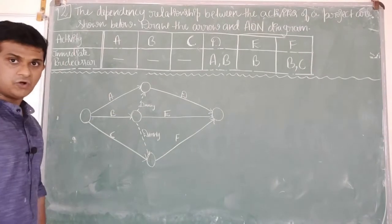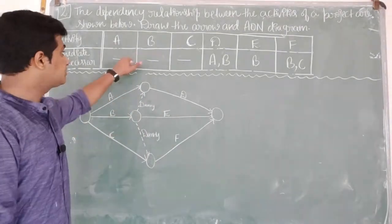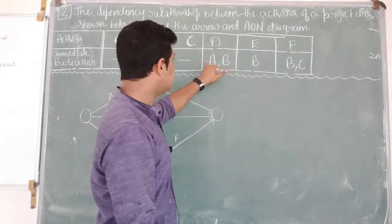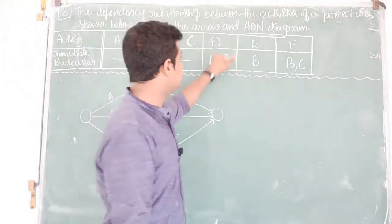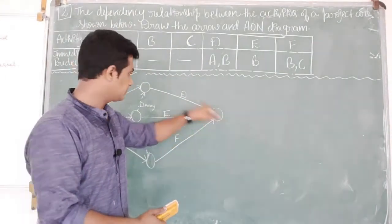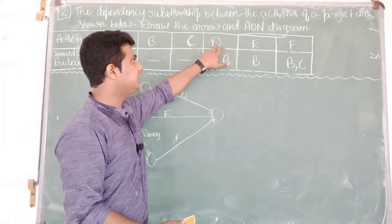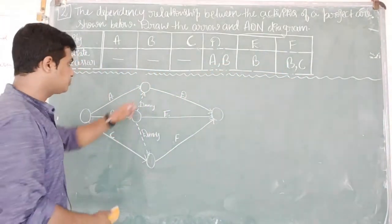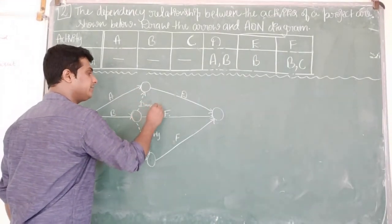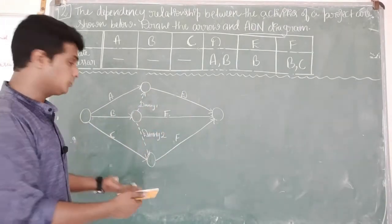So this is how we draw an arrow diagram. Remember three aspects: first, starting activities which do not have immediate predecessors; second, ending activities which do not act as predecessors — D, E, and F are not appearing in the immediate predecessor column, so they are ending activities and must end on the same node; third, since A and B must join to start D, and B and C must join to start F, we use dummy activities — dummy 1 and dummy 2 — to establish those connections.